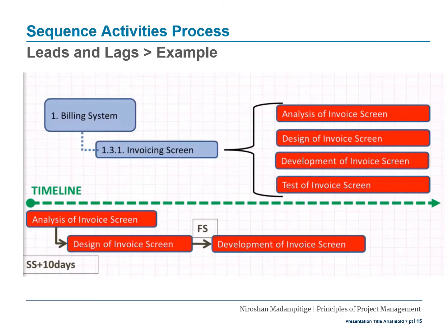After designing of the invoice screen, you can say the development of the invoice screen can start. In this case, I'm saying there's no lag time or lead time. It's just that between design and development, there is a finish to start relationship. That is to say, as soon as the design of the invoice screen finishes, the development can start.